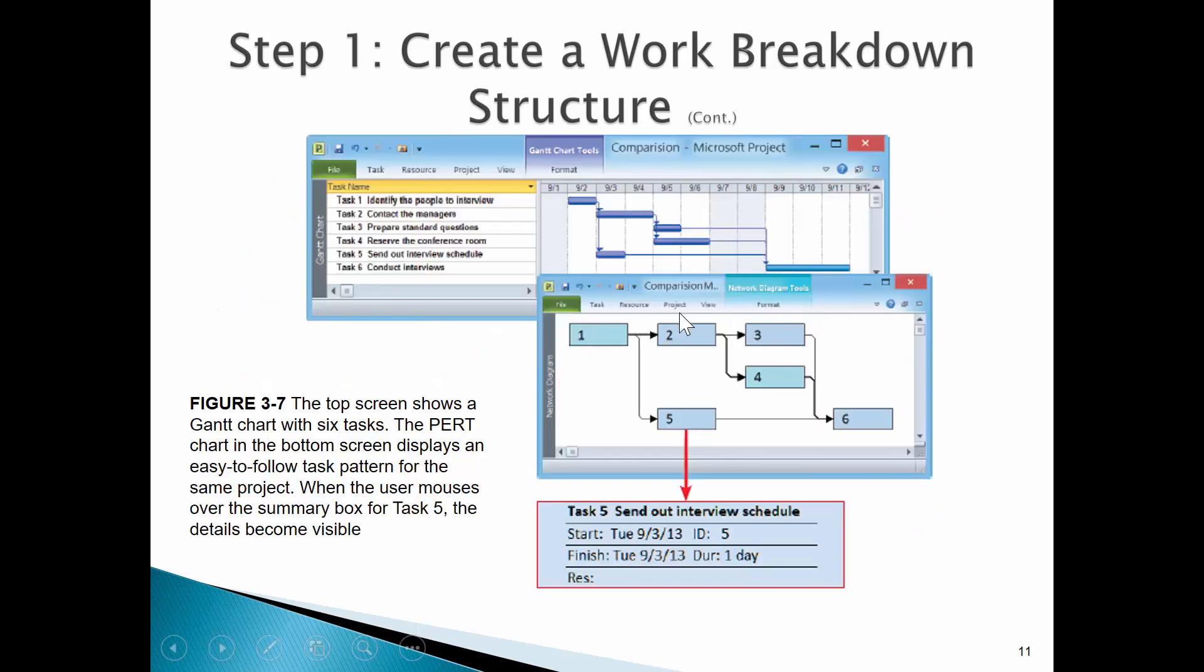Where a Gantt chart offers a valuable snapshot, PERT gives us more detail. It's better for monitoring. It gives us task-related detail within boxes and that structure to know, is this a task we're doing concurrently at the same time as other tasks, or is this sequential where we have to finish this task before we can start the next?